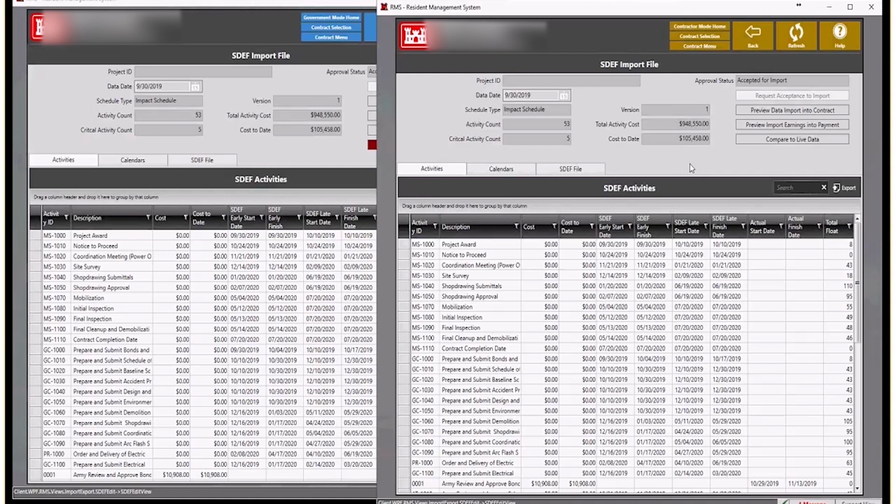So when you're in the field, you go and look, did they complete about 10% satisfactorily, and it passes all the inspections, et cetera. Well, then you can justify that they're about 10% on the amount they're requesting on that specific activity.